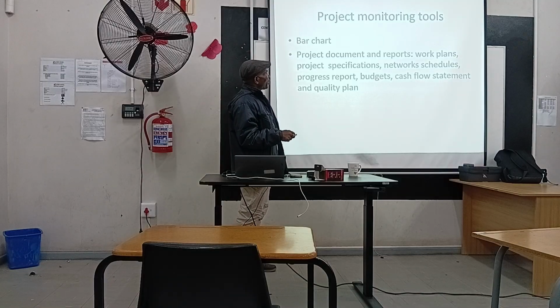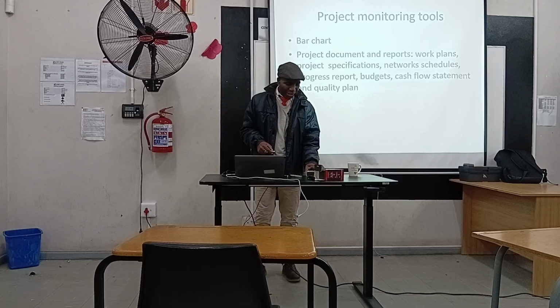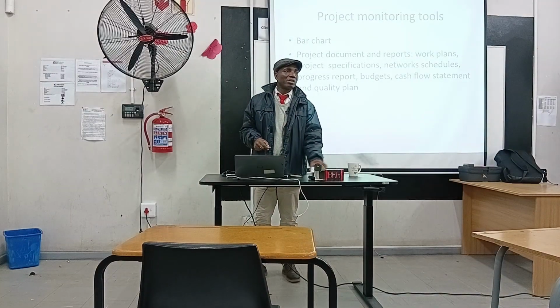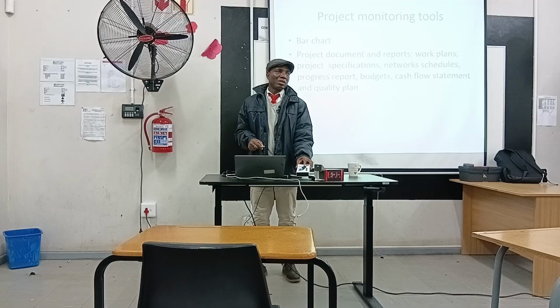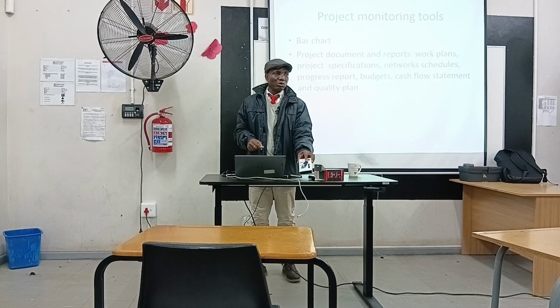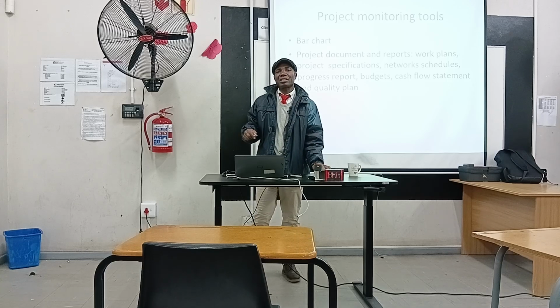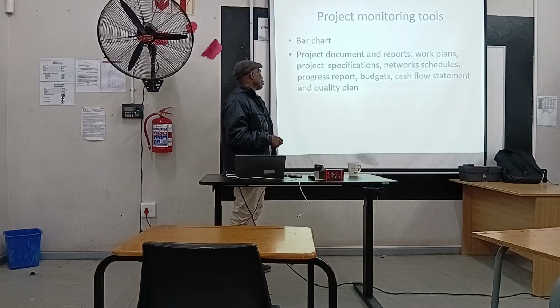What about the work plan, right? The work plan is like a schedule. You know at a specific period of time what needs to be done, right? You specify it. At week 3, 75% of the job should be done. So during the execution, you must compare at week 3 whether exactly the 75% has been done. So you can make use of a work plan or work schedule.